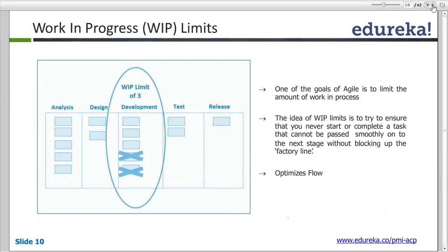No. So see, when you start your iteration or your project, and in a particular iteration you are having 10 requirements, all the 10 requirements would be in your not started. Once you start working, there could be a case where 2 of them are in done, 1 of them is in progress, and the rest 7 are in not started. The total count still remains 10. But the basic backlog starts from the not started column.